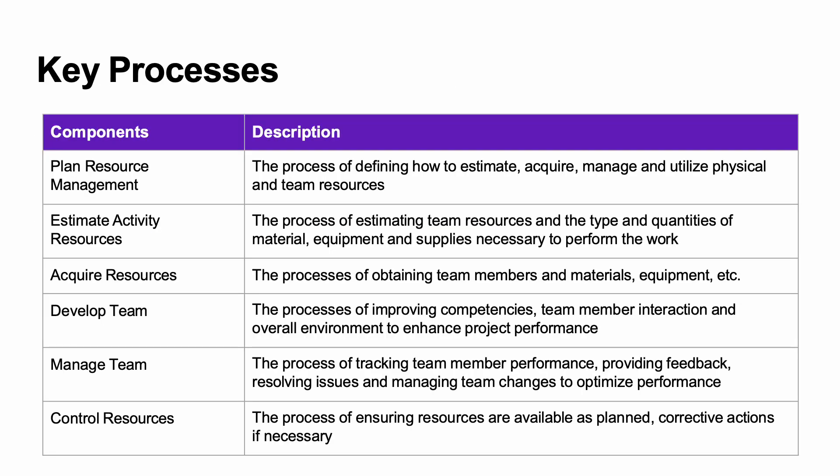Plan resource management is about defining how to estimate, acquire, manage, and utilize physical and team resources. Estimate activity resources is the process of estimating team resources — the type and quantities of material, equipment, and supplies necessary to perform the work. Acquire resources is the process of obtaining team members, whether internal to the organization or external, where procurement processes are used to source and bring them into the team.